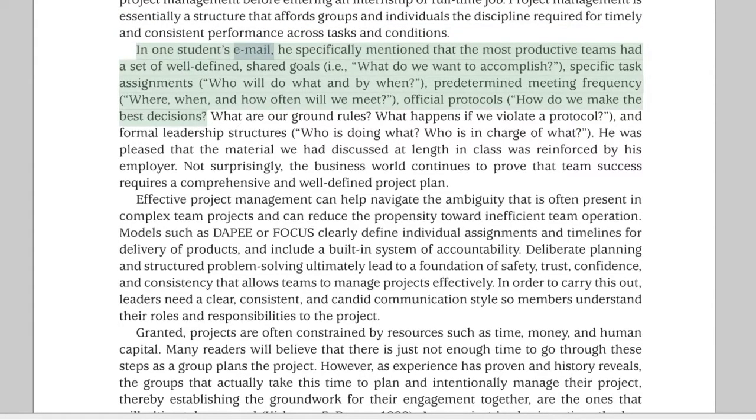In one student's email, he specifically mentioned that the most productive teams had a set of well-defined, shared goals, that is, what do we want to accomplish; specific task assignments, who will do what and by when; predetermined meeting frequency, where, when, and how often will we meet; official protocols, how do we make the best decisions? What are our ground rules? What happens if we violate a protocol; and formal leadership structures, who is doing what? Who is in charge of what?